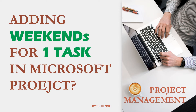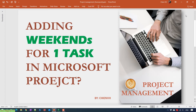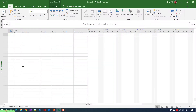Hi, in this video today I would like to show you how to add weekends for one task in Microsoft Project. So for example, in a project when you have some tasks running behind schedule, you want to add more resources to work on the weekend to bring the project on track. In this video I will guide you how to do some customization to add weekends into a specific task.